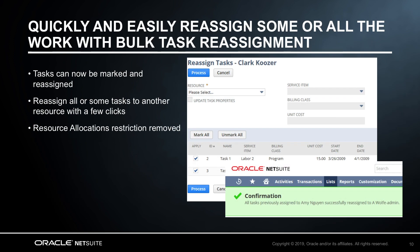Staying on the subject of resource assignments, we've included in the 19.1 release the ability to reassign all or selected tasks for a resource on a project. This can be done for a selected resource for all assignments by using Mark All or by selecting assignments individually. This capability is required when a resource becomes unavailable due to time off, unplanned absence, or departing the company. This feature will help resource managers quickly and easily reassign some or all of the work to another creative resource in one single simple process.